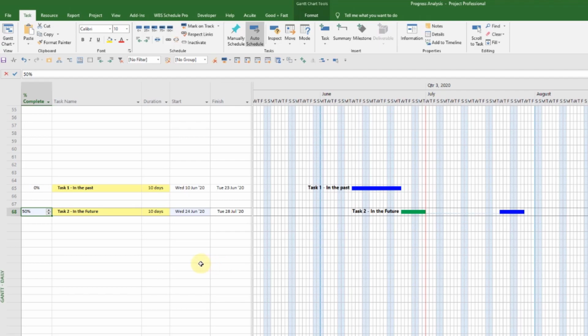Now, what you could also say is that if this work is 50% through and has already been done, then there is nothing to stop this work. At the moment, it's not linked to anything. In these 2 examples, they're not linked to each other. They're just 2 standalone tasks. So if I could start this early, and I'm now 50% through, what is stopping me from carrying on this work and doing it here?